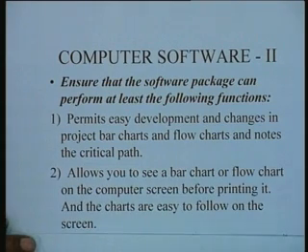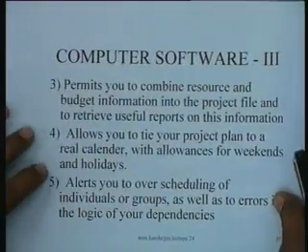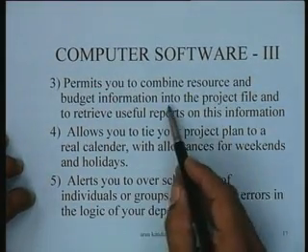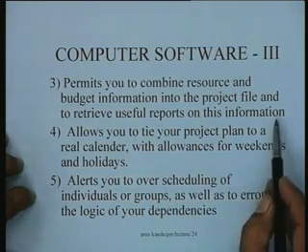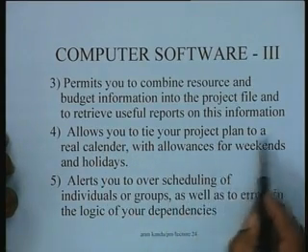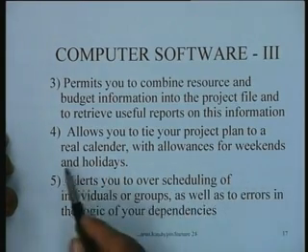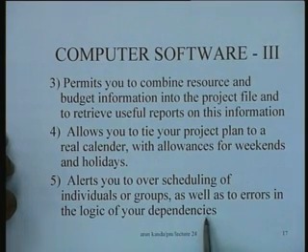It allows you to see a bar chart or flow chart on the computer screen before printing it, and the charts are easy to follow on the screen. You should be able to do that. Then it should permit you to combine resource and budget information into the project file and to retrieve useful reports on this information. That's what it should be able to do. It should allow you to tie your project plan to a real calendar with allowances for weekends and holidays. It alerts you to overscheduling of individuals or groups as well as to errors in the logic of your dependencies.